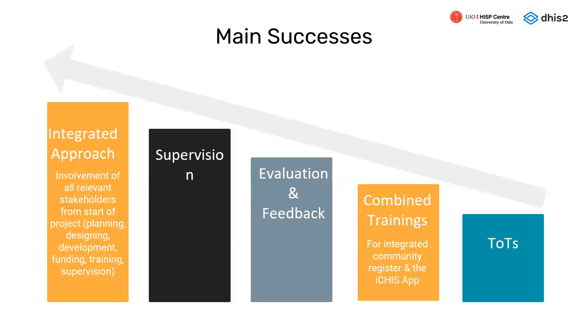One of the main successes is that over time we've put together different teams to have training of trainer sessions. And then we've also had combined training, because the ministry is also at the same time deploying paper-based community registers. To make people comfortable, we're at the moment facilitating the trainings for those paper registers together with the app. We've also over time introduced pre and post assessments for the trainings, just to have some quality checks in terms of the work that we do. Post deployment, we do have routine visits to the districts to evaluate how things are progressing. And then we've had an integrated approach in terms of system development and the trainings rollout, as well as the supervisions. You see that in the final slide.